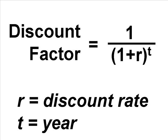The next thing I need to do is calculate the discount factor using the following formula. The discount factor is 1 over (1 plus R), where R is the discount rate — 10% in our example — and all of that is to the power of T, which is the value for the year. So in year 1 that will have a value of 1, in year 2 it will have a value of 2, and so on. That's our formula for calculating the discount factor that we'll apply to all costs and benefits for each year.